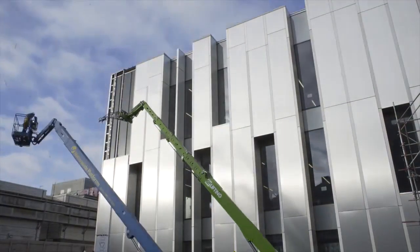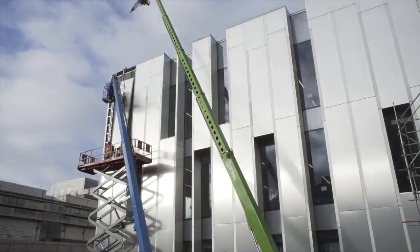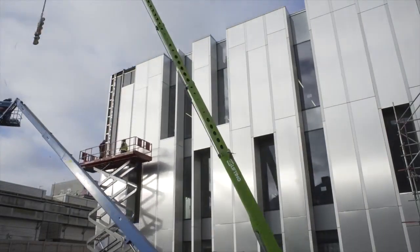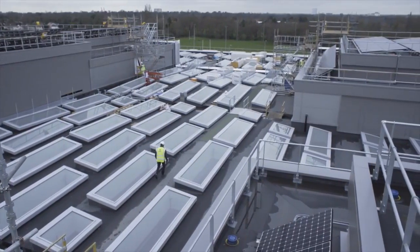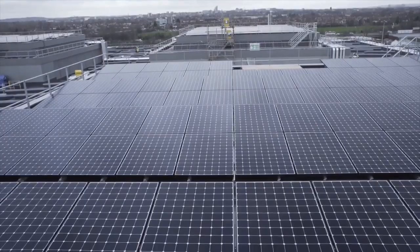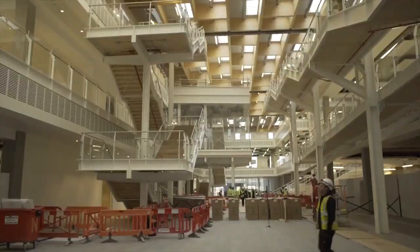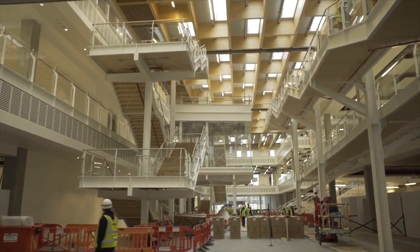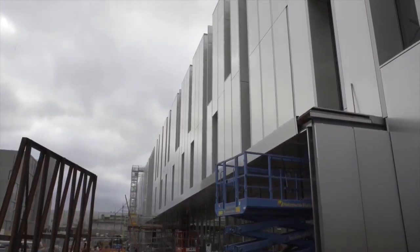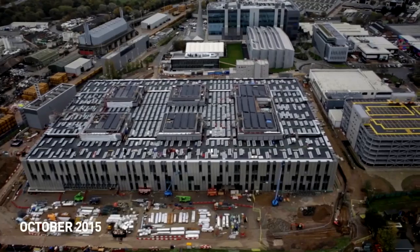Sky had to be delivered in effectively a year, so we're talking about a project north of £25 million being executed in around 12 months. That level of investment needs a very well defined and understood supply chain to support it. So we've executed this project as one team. We've worked with Sky, we've worked with Mace, and we've worked with a supply chain that's been very carefully selected, to ensure that where we reached difficult points in the programme, the relationships, backgrounds and behaviours that we would expect from a repeat business point of view were there to enable us to ensure delivery for Sky.